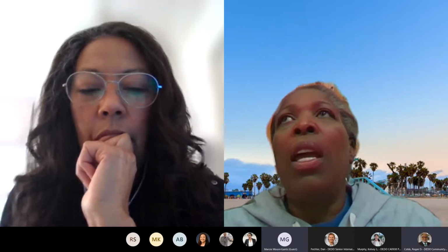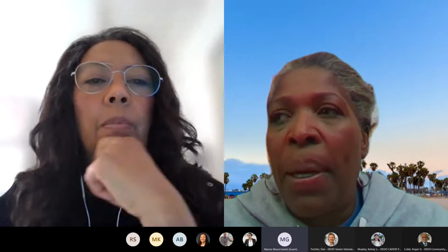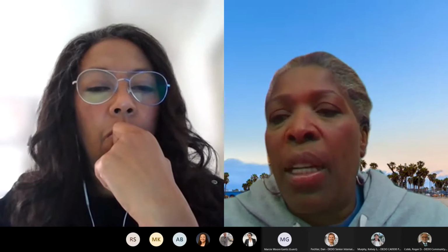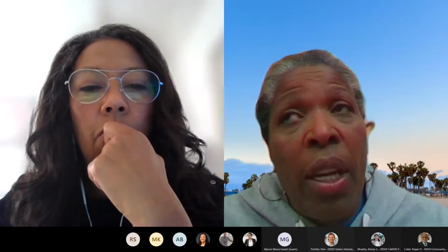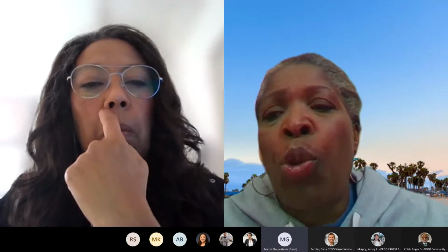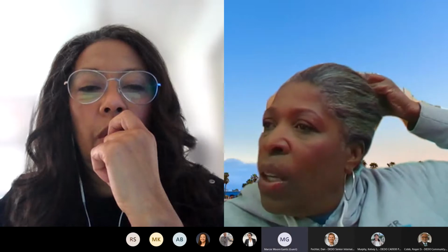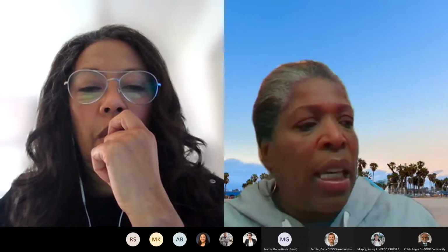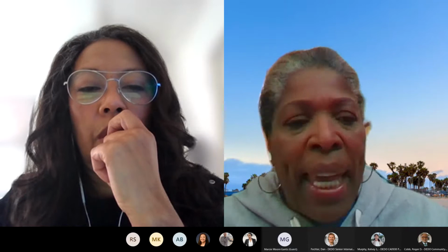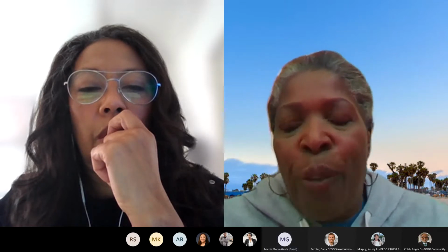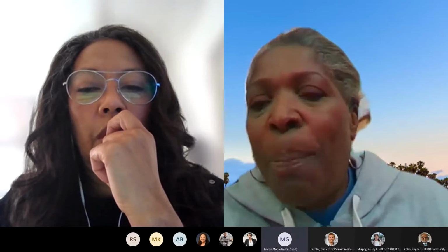Okay. And so what's realistic? 5%? 10%? We typically do a de minimis, which is about 10%, but it really depends on how many partners there are. Some people may apply and there might be 3 partners, let's say, and an administrative or fiscal sponsor. We look at everything on a case-by-case basis to see, is this reasonable based on the amount of data that they have to process and submit, and those invoices that they have to review and then submit to us to be reimbursed, and then for that fiscal agent to pay out to each of the partners.